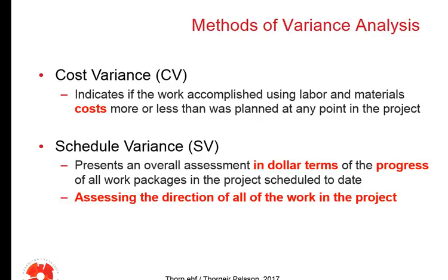Cost variance, just to go back to that issue, indicates if the work accomplished using labor and materials cost more or less than was planned at any point in the project. It basically tells us have we spent more than we planned to have spent at that point in time.